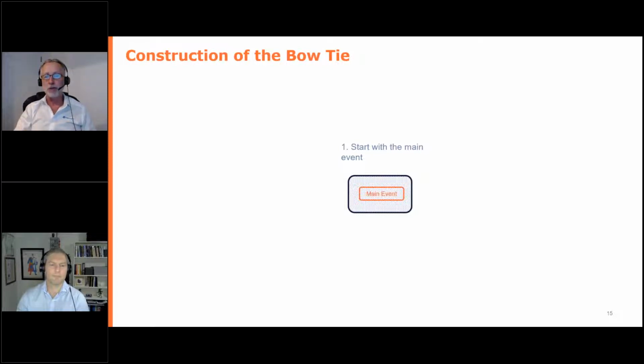So cyber intrusion will be at that center point. If it's to do with data management, it will be the point that you lose control over that data. And if you're climbing a ladder, it's the point at which gravity takes effect and you have now started to topple. So the main event is the point at which you effectively lose control of the situation.